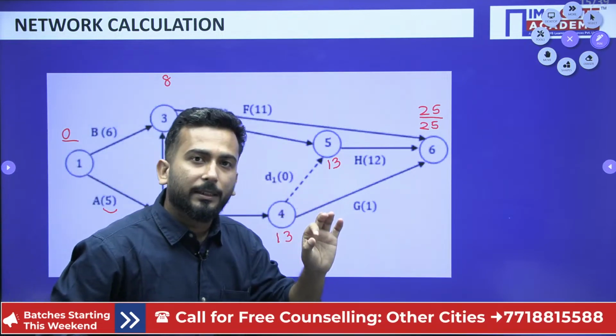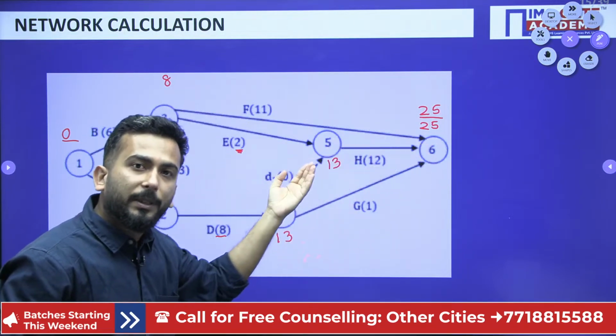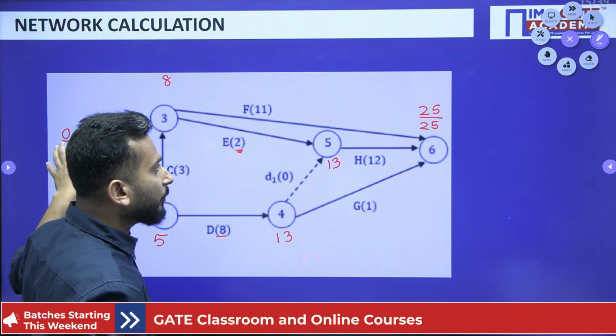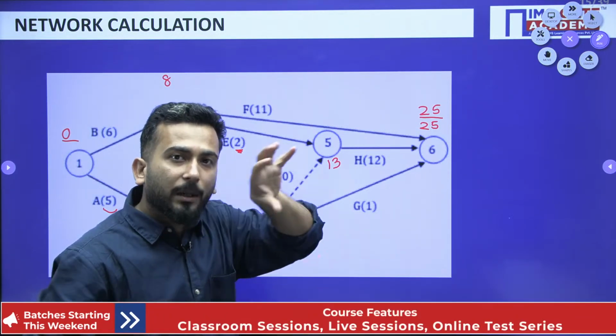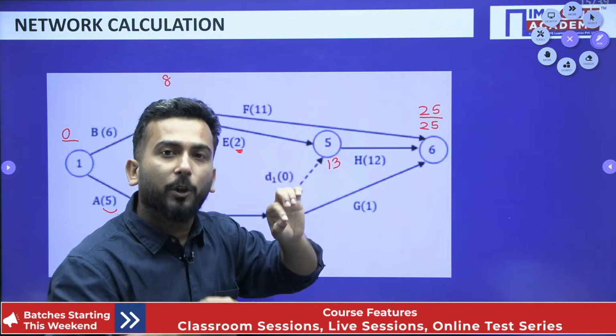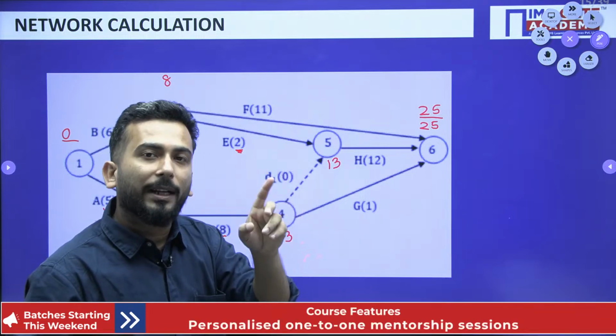Now, my dear friends, from the last event you have to come to the previous event, till event 1, and you have to see in how many ways it is possible while you are coming backward. When you are going forward, you are adding the activity.